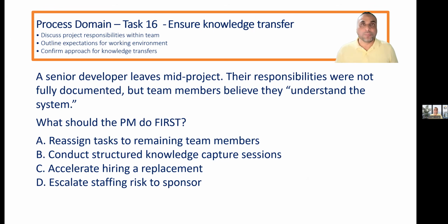So you have to ensure that there is a proper mechanism of collecting the lesson learned, and it has to be done accordingly. So discuss project responsibilities with the team, that who can do what, outline expectations for working environment by using the team charter and ground rules. That's what we expect from all of you. Confirm approach for knowledge transfer, that do we have the valid mechanism, do we have the right questions available to be asked, do we have a knowledge database which can be providing you back the information.